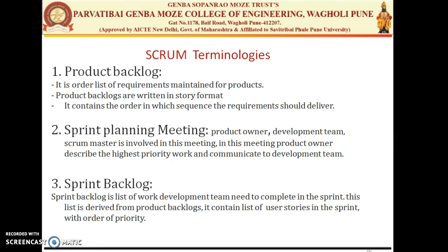So a simple agenda for the sprint planning meeting is finalizing the product roadmap, status of your development, name of the iteration, what name should be given, velocity of the previous iteration, the capacity of the team, what the different concerns are, some review of the previous work, what update should be done or any update to the requirement, some stories to be discussed, then commit. These things are generally involved in a sprint planning meeting.